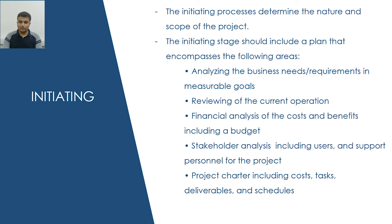The first step is initiating. The initiating process determines the nature and scope of the project. The initiating stage should include a plan that encompasses analyzing the business needs and requirements in measurable goals, reviewing of the current operation, financial analysis of the costs and benefits including a budget, stakeholder analysis including users and support personnel for the project, and a project charter including costs, tasks, deliverables and schedules.